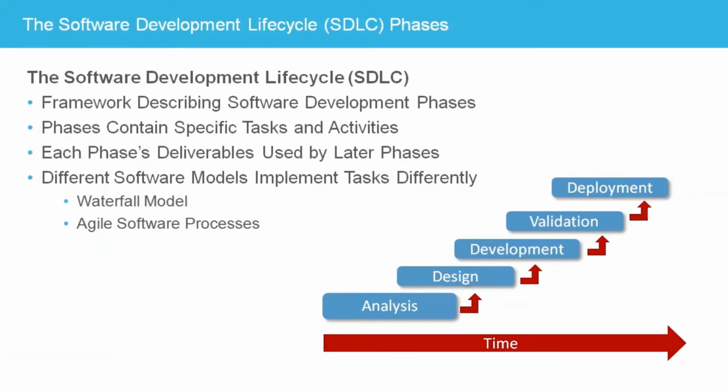The development phase is where the software engineers use the system design to implement the software application. This work requires several development environments, each equipped with all the supporting software tools. Development activities in this phase include writing and testing code, code reviews, database creation, and system integration. Quality assurance activities include writing test cases, creating test files, and setting up an isolated test environment. The result of this phase is a working engineering software application ready for validation, and the QA test cases.